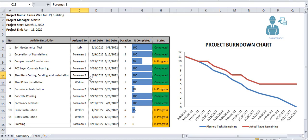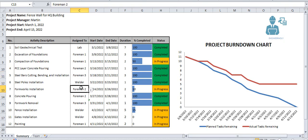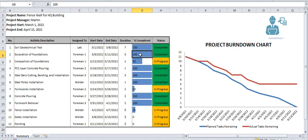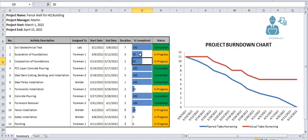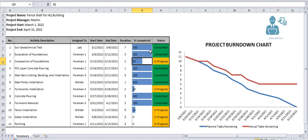These are the list of activities and we have our resources here, to whom we have assigned every single activity, and every activity started and ended and duration and working days. Besides that, the percentage completed of each activity is given here. If you take the percentage completed less than 100%, the status will be automatically updated to in progress.